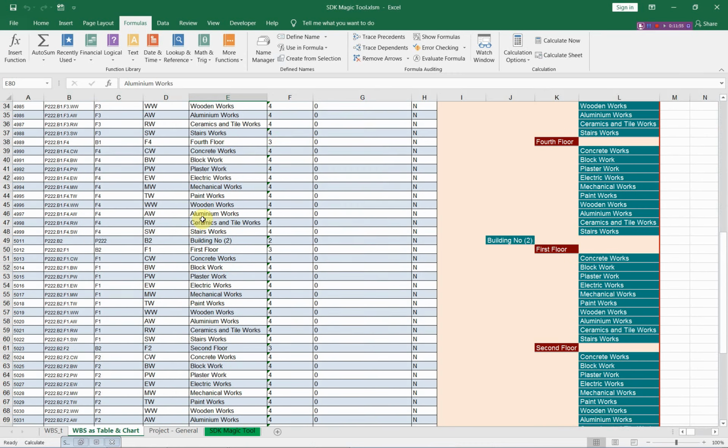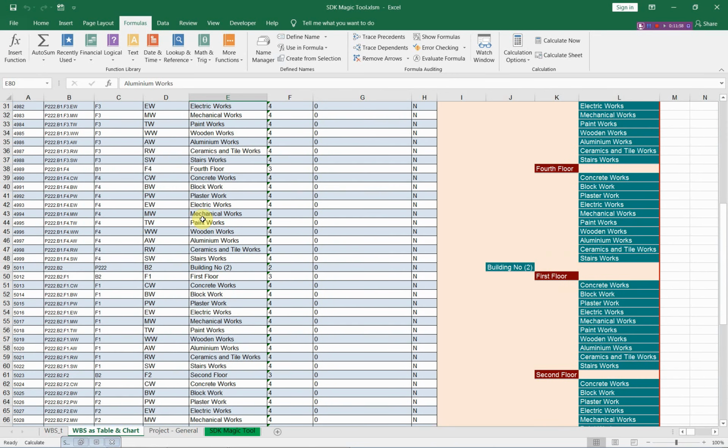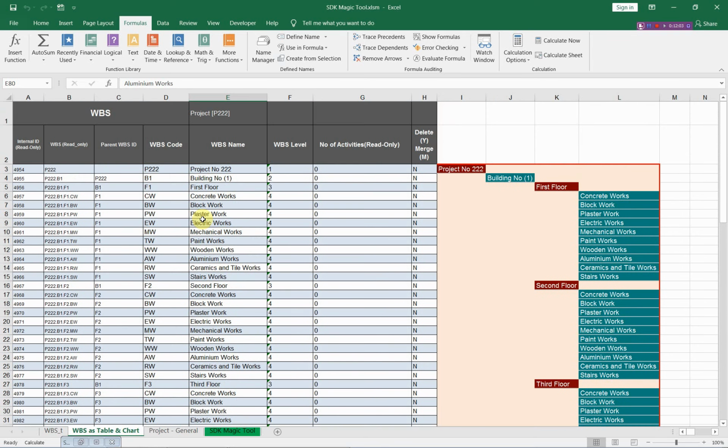As you see, this is the easiest method to export the WBS from Excel to Primavera, and I think you will not make any mistakes when you draw this diagram. And when you keep these two rules, all WBS in the same level will be in the same column. As you see, level number 1, level number 2, level number 3, and the last level in this WBS structure, level number 4. And you will put each WBS in a separate row.